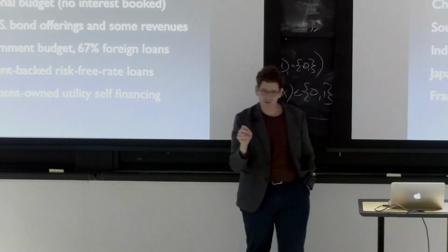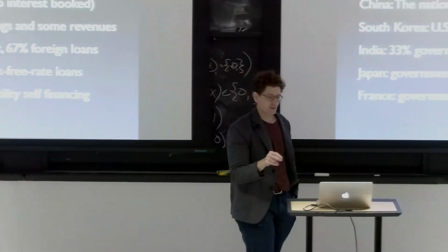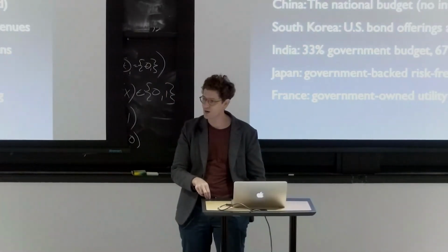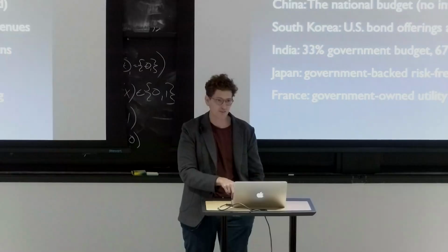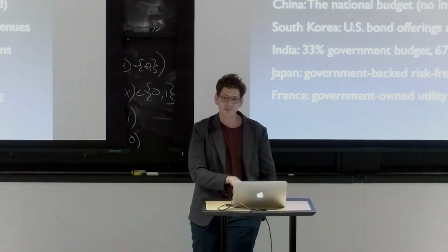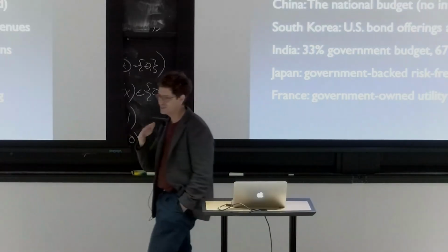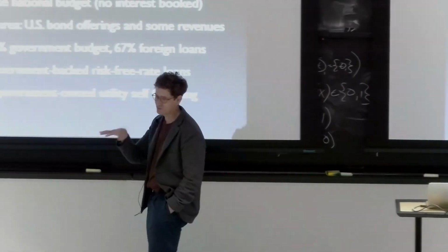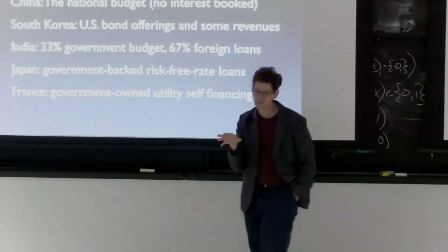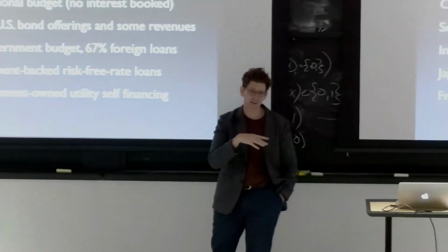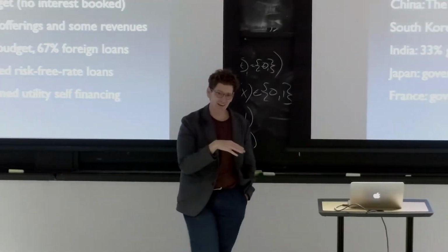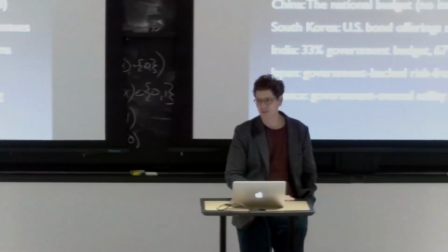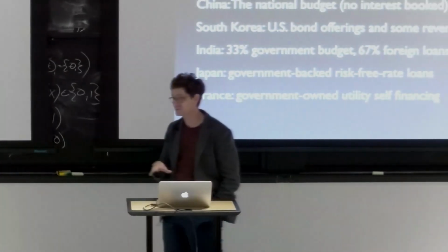They got authorization from the Public Utility Commission to begin billing their customers for nuclear power 10 years before they started making the power. So they just basically, through ratepayers, billed them for the cost of the plant. So all of this reduced their finance costs dramatically. And that combination of things is what allowed Vogtle to be built in the US. But it is not a generalizable strategy.